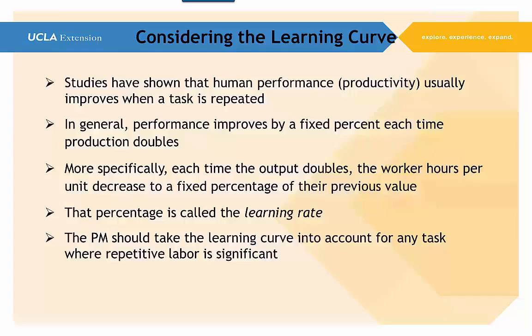As project managers, we very seldom get involved in learning curves or learning rates or a learning curve kind of consideration. But sometimes we have projects where there is a repetitive activity going on, and it doesn't need to be making a product or putting something together. It could be paperwork, writing reports, or writing certain documents. If it's a repetitive process, the project manager should be familiar enough with the learning curve to take it into account when we're talking about the amount of productivity we get and what the duration of some task might be.